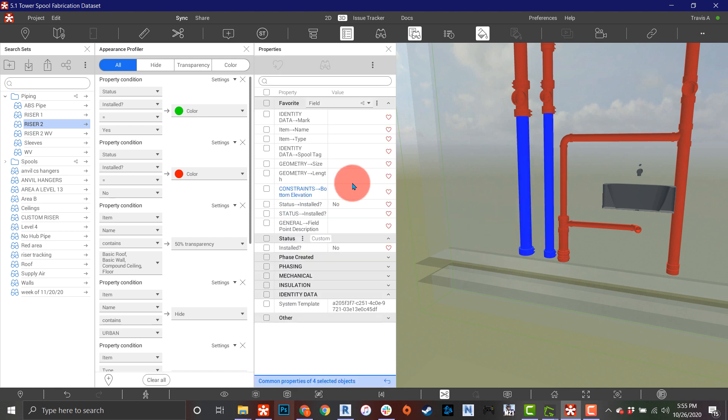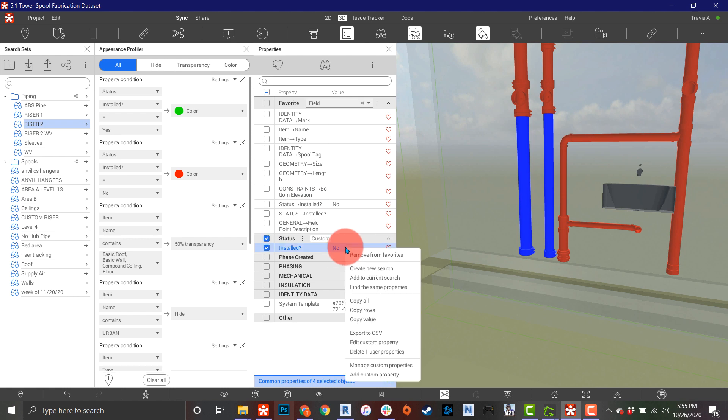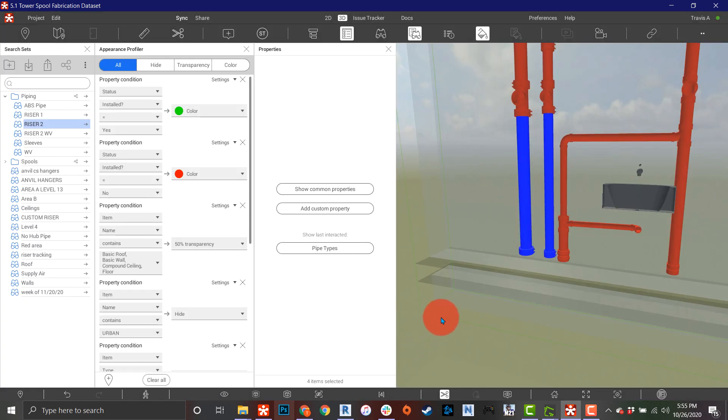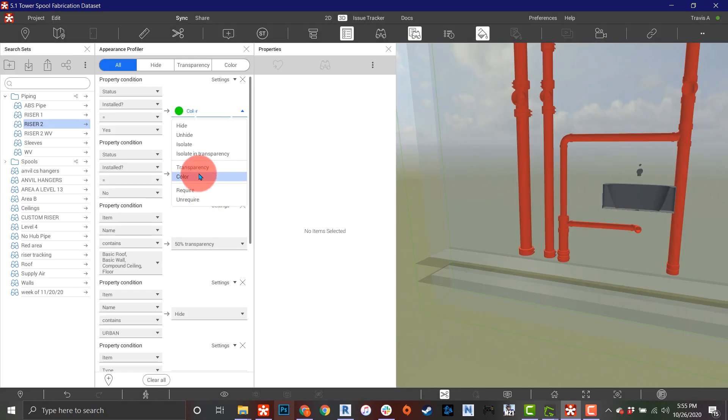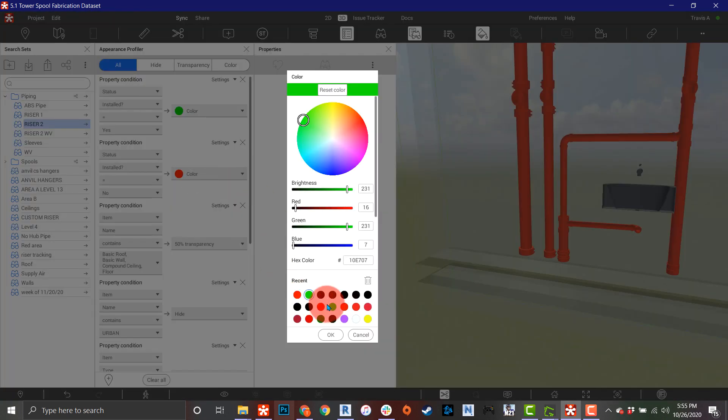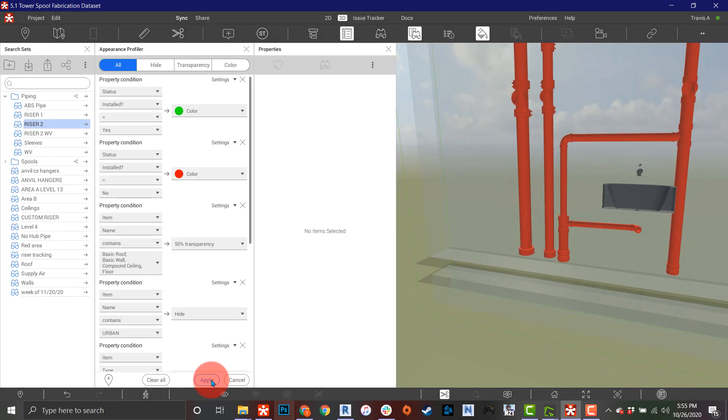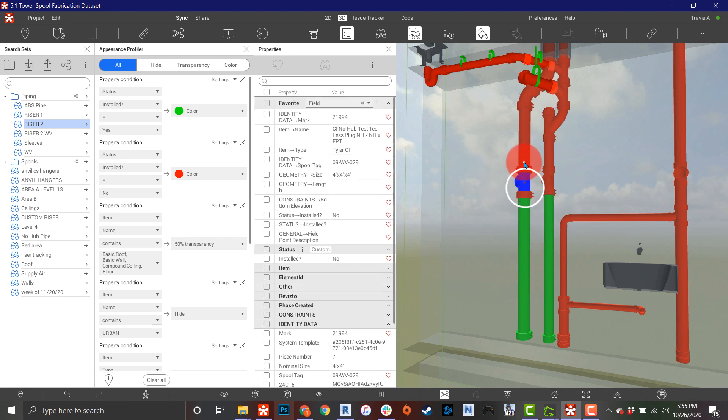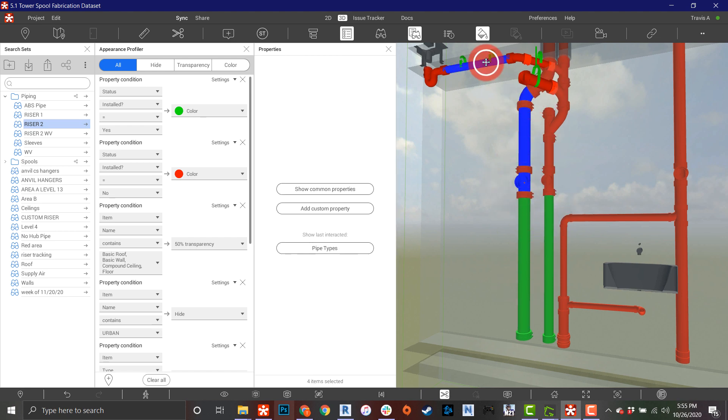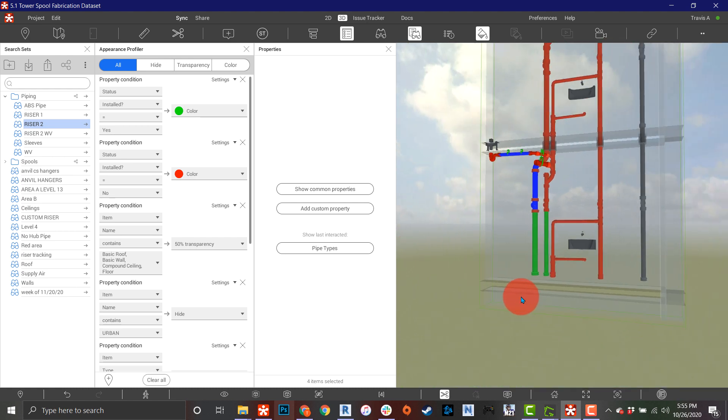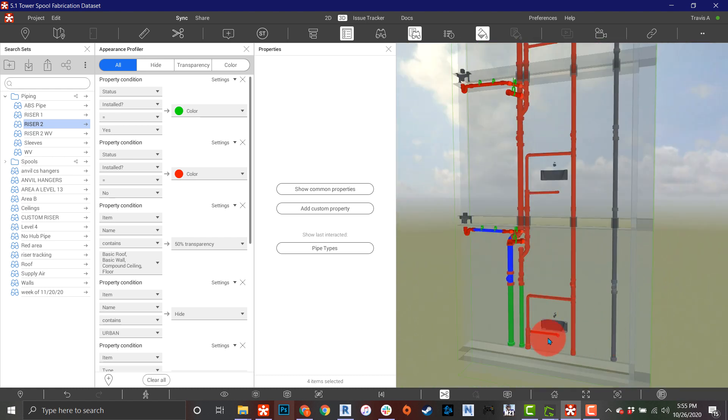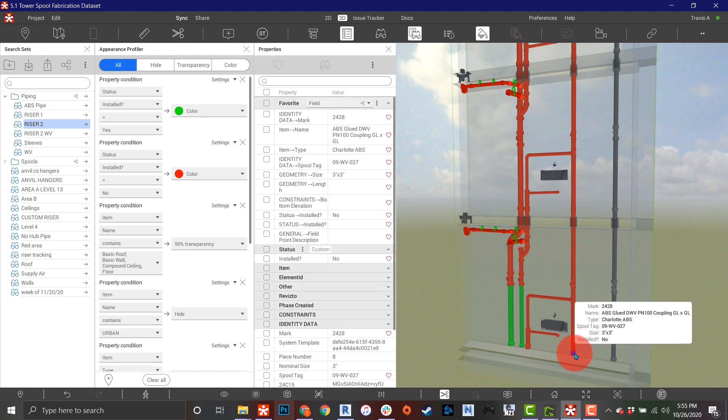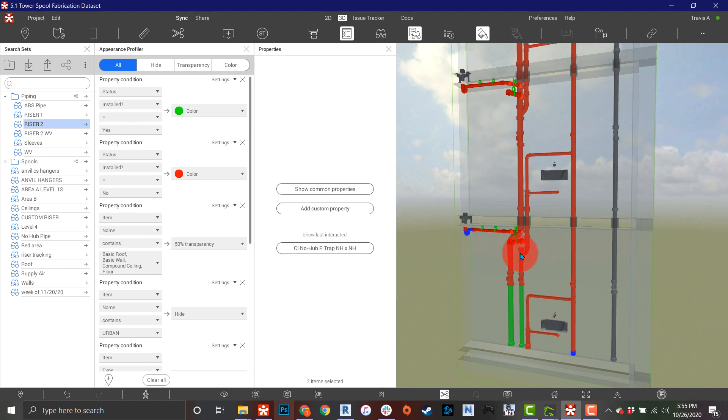Now there's one way to track parts and start turning these to installed. I can come in here and say show common properties, then I can right click on this, say edit custom property, and then say yes. Then I'd rerun this - when we have appearance profile templates you'll be able to just click apply real quick. That's a quick way to do individual parts, but you can see it would take forever to click all these parts. What I propose for you to do is teach your guys - because they're always going to be building from bottom up - teach your field crew to come down here and grab just like we did to make this rise.